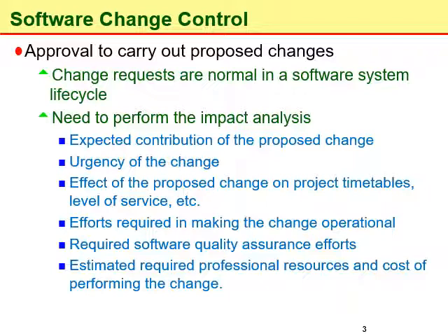Then, the effect of the proposed change on project timetables and level of service. Of course, that is straightforward, and that has to be analyzed because there are several other activities related to the project that are currently in progress. So those activities might be affected if we accept the change request proposal without performing the impact analysis. Then the efforts required in making the change operational, and the required software quality assurance efforts.